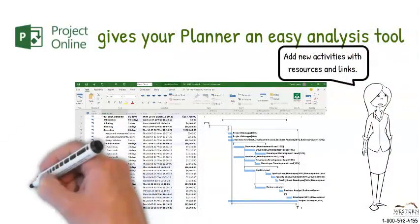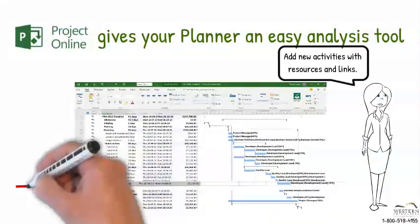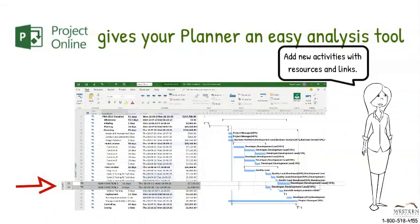Insert the new activities into the plan. Estimate and assign the work and link it into your plan with predecessors and successors.